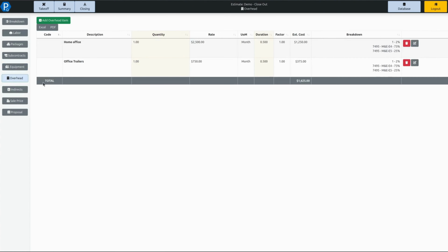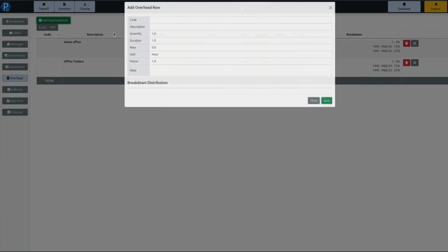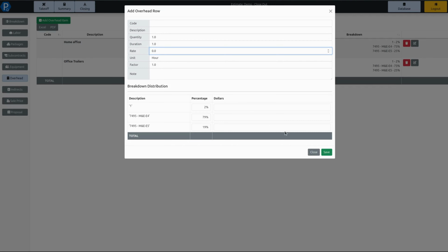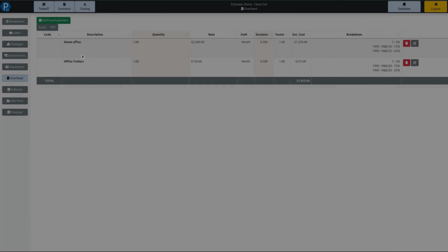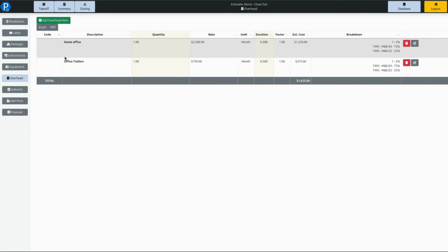From there, we move into the overheads and indirects tables here. Not going to go into a lot of detail on this because every company has different methodologies of handling this. Different concepts of what an overhead is versus what an indirect is. But within here, we have the ability to add in arbitrary line items with rates, and all of this can also be pre-populated in your estimate assemblies, and that is the recommended practice if you use one of these tables. Pre-populate it within the template so every estimate you open brings these values in by default.